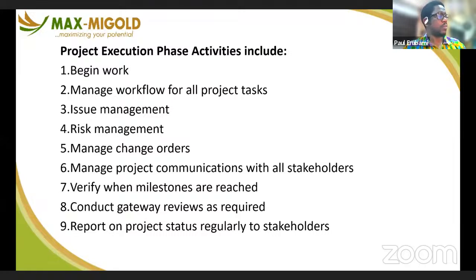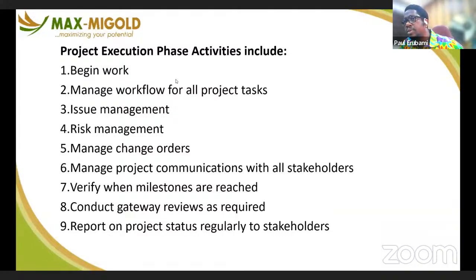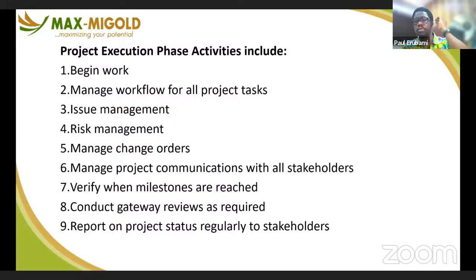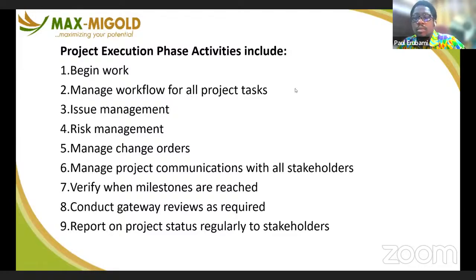If you are lagging behind, you know that you need to do a crash program to be able to meet up with time. If you are doing well in terms of time management, you look at it vis-à-vis the project baseline to ensure everything is properly managed. Then you need to report on the project status regularly to stakeholders.